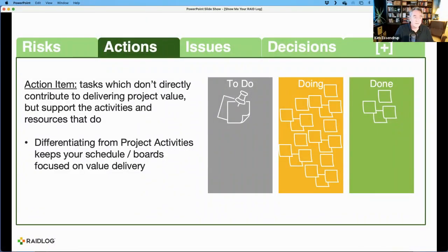There are a lot of things that fit in this category. A few examples: I'm having a meeting with my team and, oh hey, we need to find a new conference room, or we need to follow up on getting that purchase order approved. Our projector broke. I've got to follow up with my executives and make sure that they click approve on all the things they need to approve in the purchasing system. All those little things that you've got to follow up on probably don't belong as discrete items in your project plan.